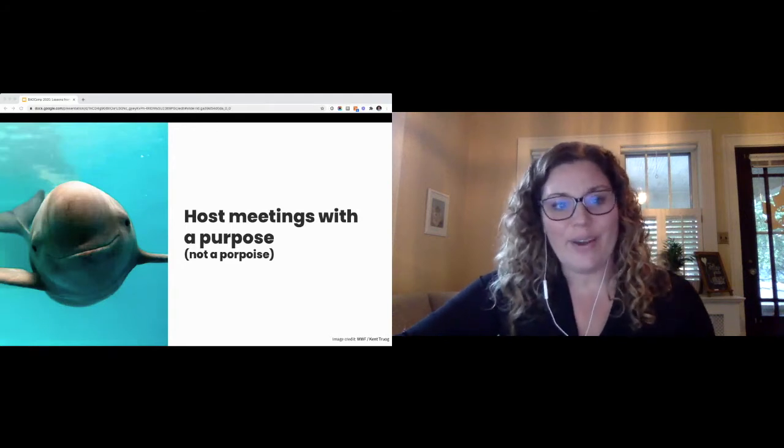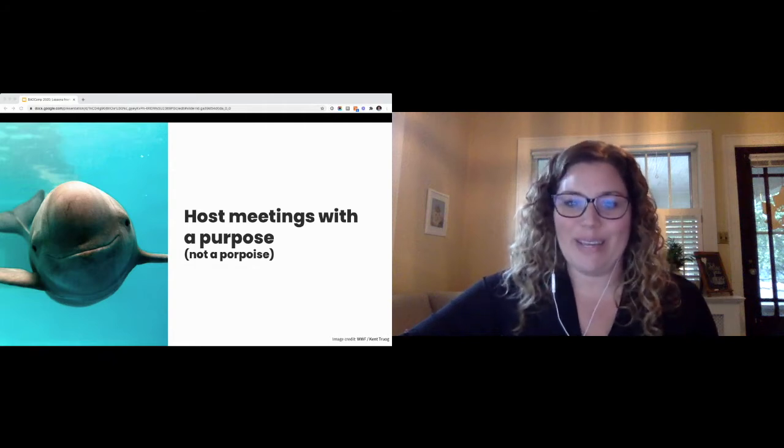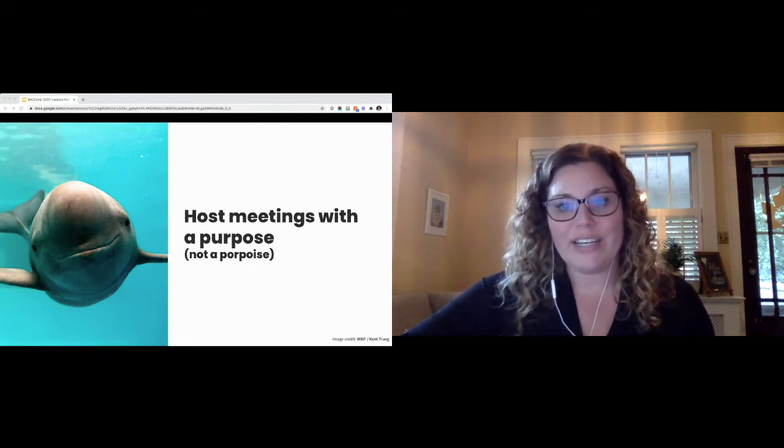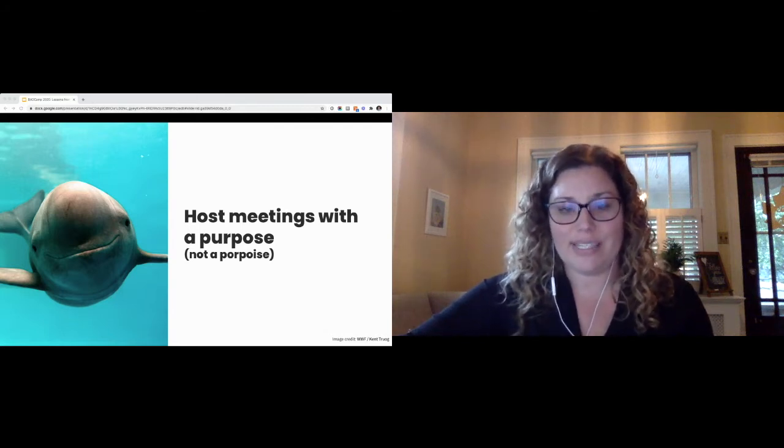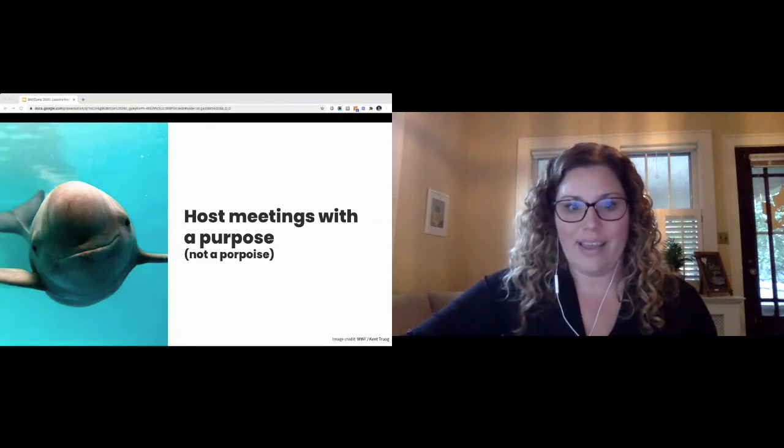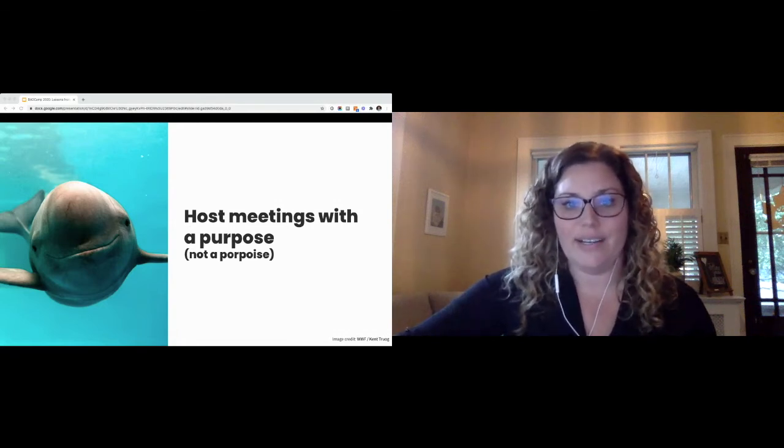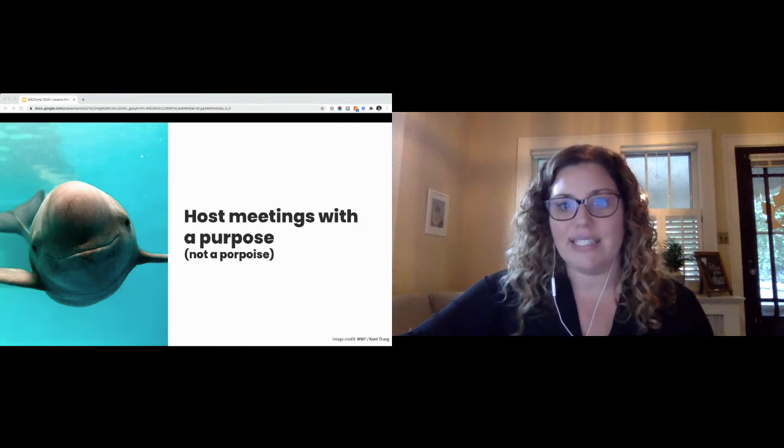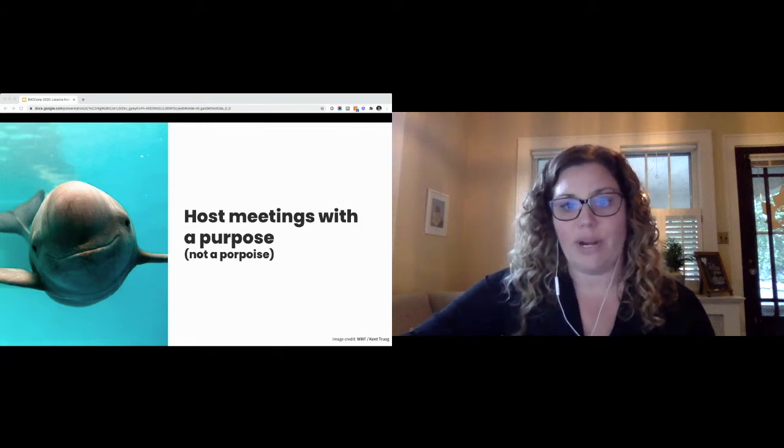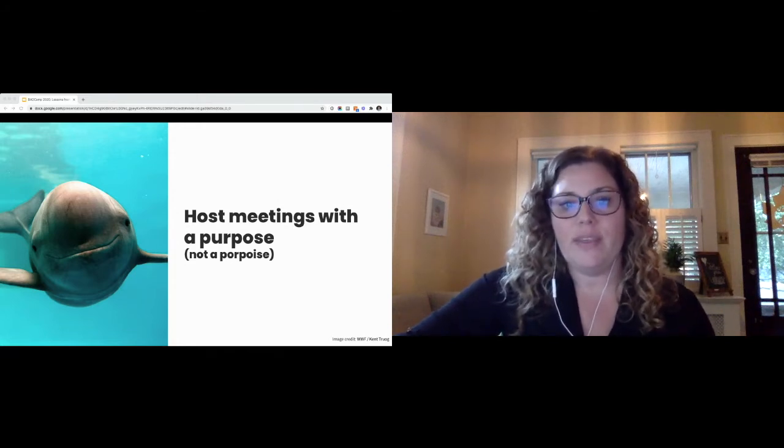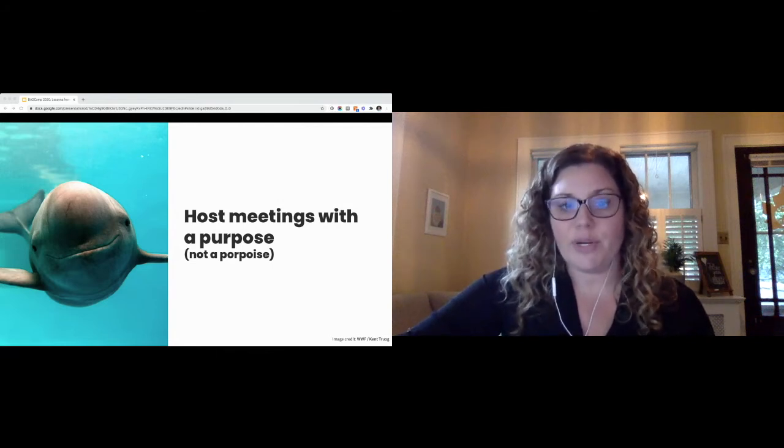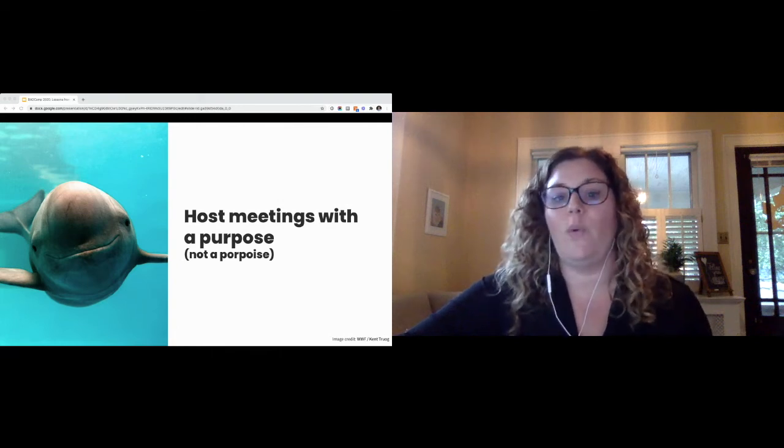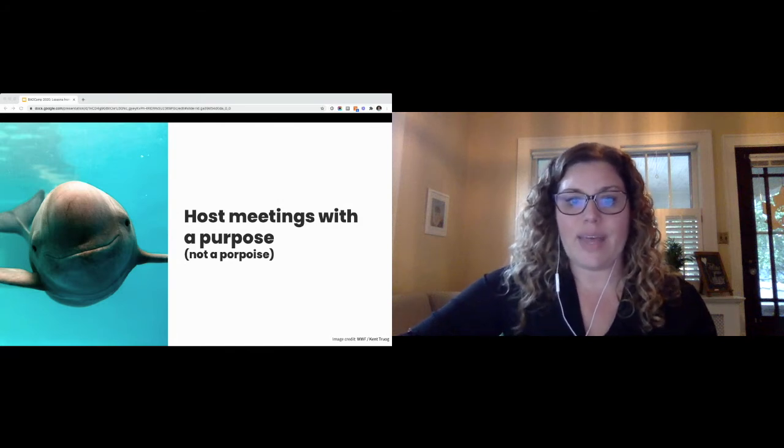Speaking of meetings, host meetings with a purpose, not a porpoise. As a project manager, you're probably hosting a lot of meetings. Meetings get a really bad rap, but when working in a distributed team, they're critical to collaboration and communication. Even if you aren't practicing Scrum in a strict sense, you can learn a lot about the various ceremonies included in the framework. Sprint planning, this is when the team gets together and decides what they need to work on and complete it in a given time frame. Daily scrum, this would be a short check-in meeting to discuss the status and align as a team. Sprint review, this is a meeting to demonstrate the work that's been accomplished to the team and the stakeholders. And a sprint retrospective, this is when the team reviews the work and discuss what went well and what didn't go as planned, so they can iterate and improve moving forward.